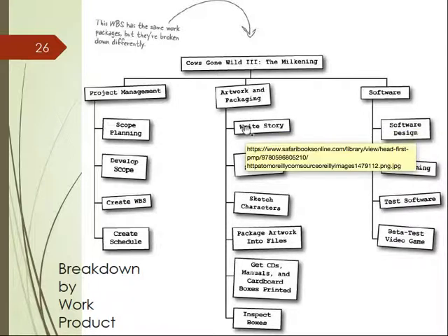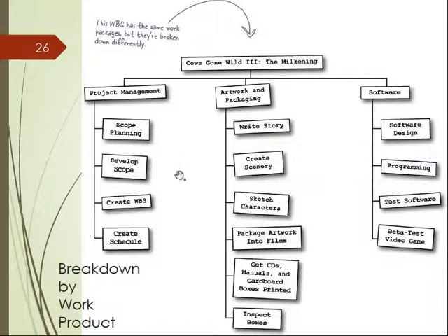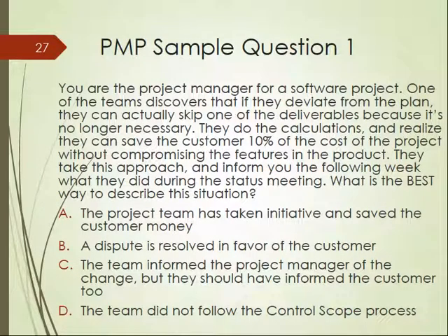If you want to assign some people to write the story, assign some people to sketch the characters, you need to divide the task up small enough, then you can assign it to someone, and also estimate the effort, and this is how you can manage a project. If you look at a project, a system, as one big thing, there's no way you can have people coordinate.